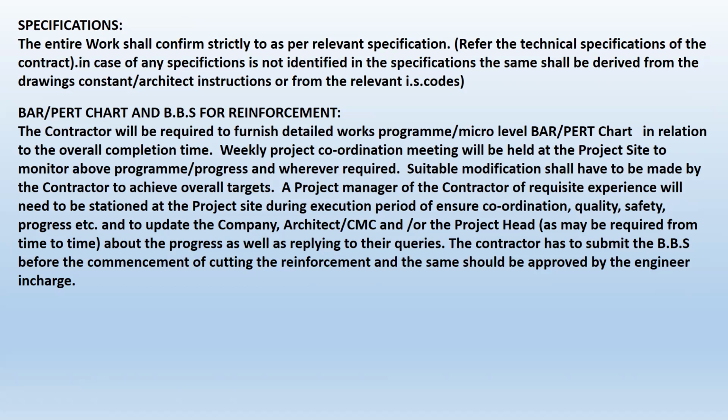Now comes the bar chart, BBS, etc. Suppose the client is supplying the steel, the contractor has to prepare a bar bending schedule because the wastage percentage has already been mentioned in the contract. So preparing the BBS is a moral responsibility of the contractor, which the client will approve. Then in the final tally, he will find out whether the material has been lost or anything. Accordingly, the client can take the right choice in finalizing the contract.